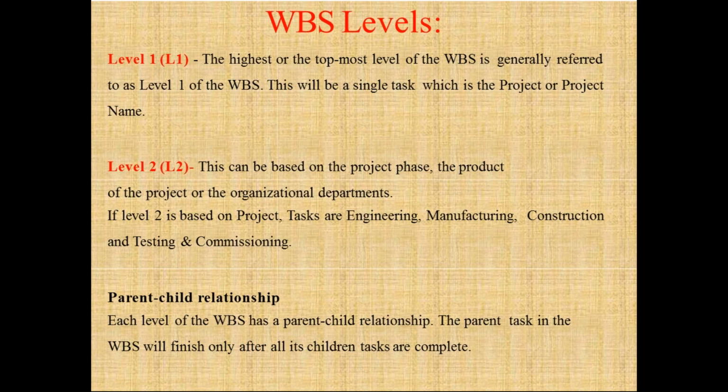So what is the relationship between each level? There is a parent-child relationship between these levels. Each level of the work breakdown structure has a parent-child relationship. The parent task in the work breakdown structure will finish only after all its children tasks are completed.